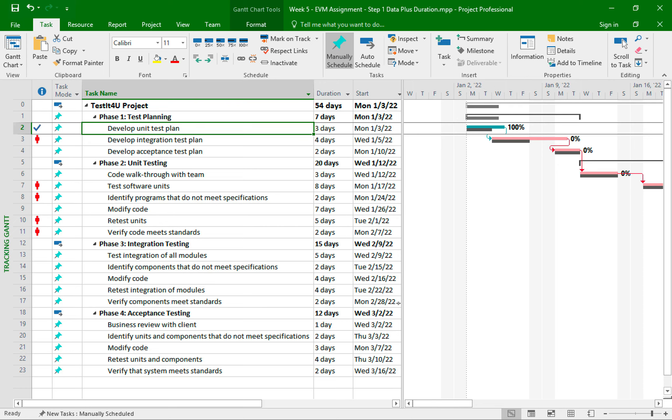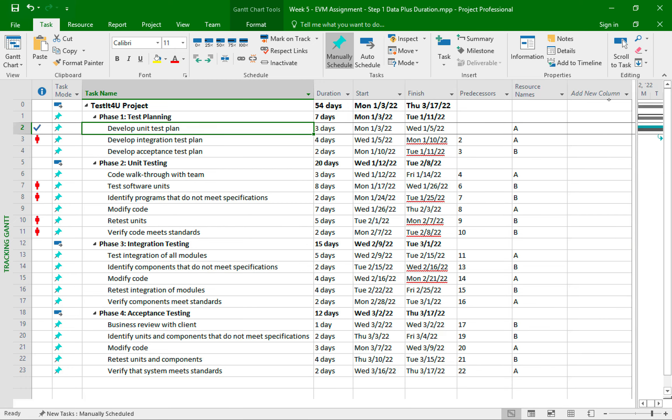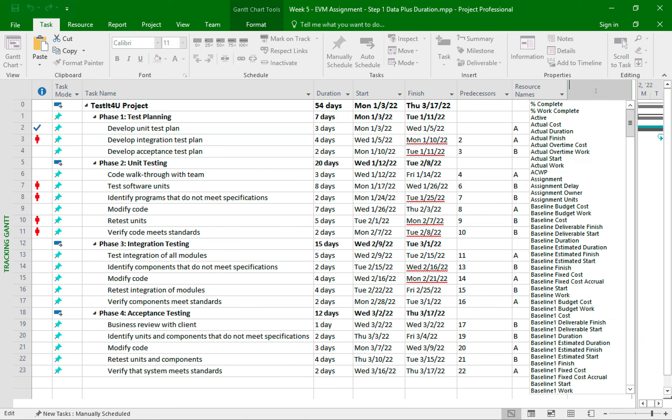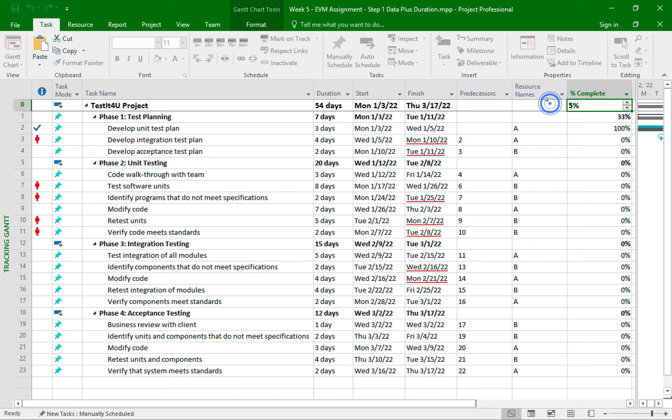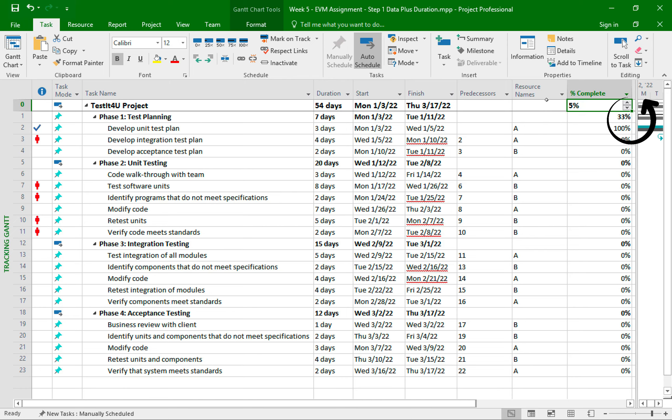Another way to enter the percentage completed is to add a percent complete column. So I'll click on the add new column. And it's the very first option. So I'll click on it. And now we can see the column is populated with the percentage completed numbers. Most of the tasks are still 0% since we didn't update them yet. But you can also see that based on the update we did for this first task, we now have completed 33% of phase one of the project. And we also completed 5% of the entire project.